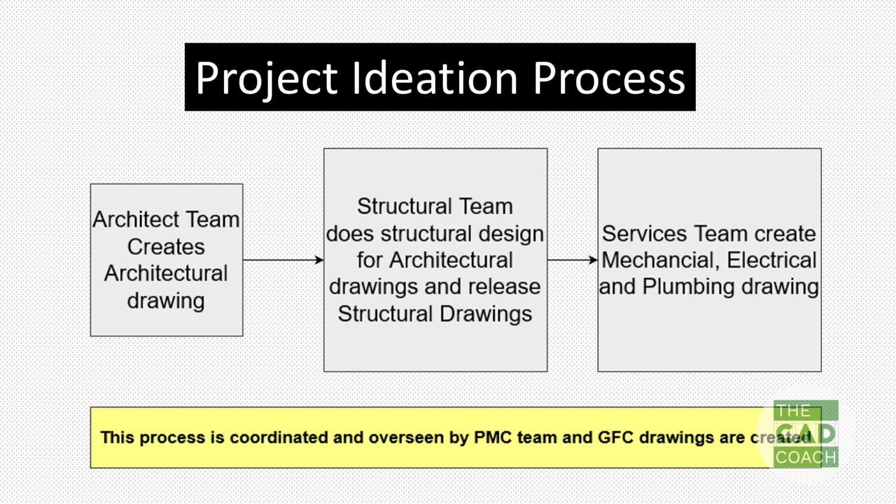This whole process is coordinated and overseen by the PMC. The PMC will be with the client, and they coordinate the architectural team, structural team and MEP team. So they push the teams on behalf of the client, they push each other, they discuss everything, and they oversee the process and create a GFC drawing, the good for construction drawing.